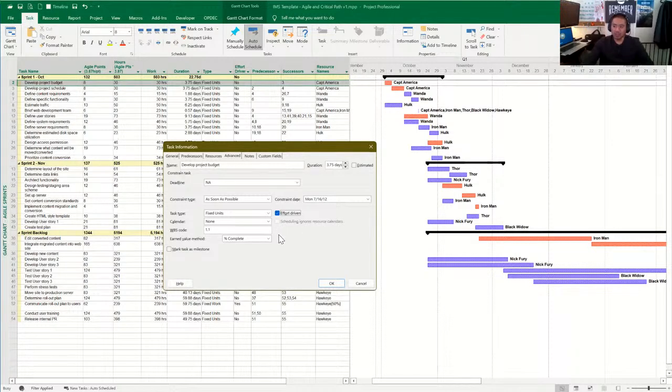If you have that checked, it will automatically ignore resource rules in your schedule. So I found that very useful to my advantage when I'm resource loading, but not resource loading, and saying that to my stakeholders. So that's the workaround to saying, yes, we're resource loading, but no, we're not.